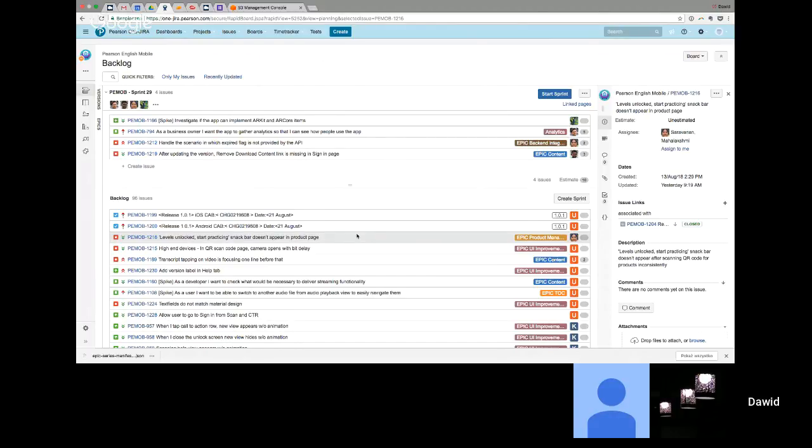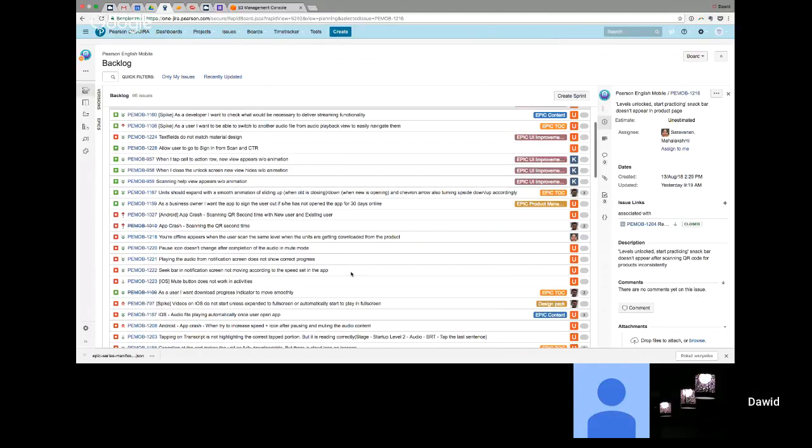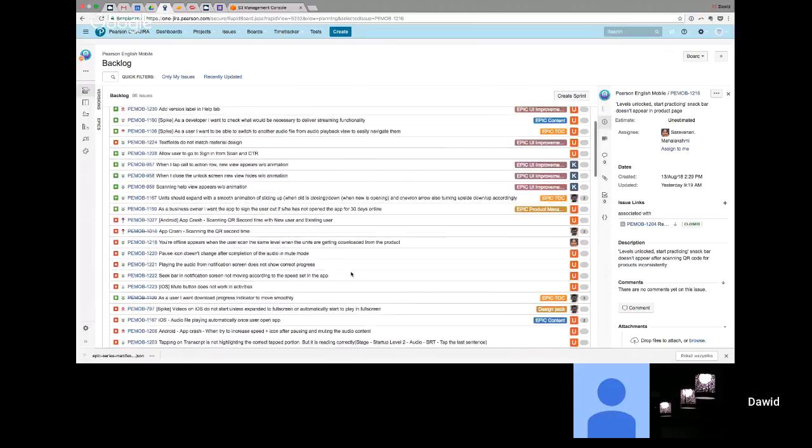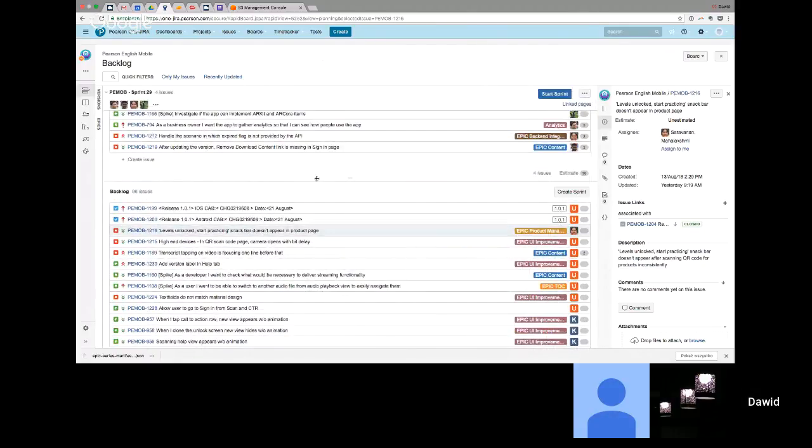Okay, so shall we leave this for now, Devin? We could, but as you can see, we have plenty of things in the backlog, and sometimes it's difficult to manage because of that. That's why I would prefer to include it in the sprint and decide whether we can fix it or not, whether we can find the steps to reproduce or not, and if we cannot, we close the story. Let's not keep it just in the backlog so that it stays there forever. My suggestion would be to reassign it to Sindhu with a comment: please find steps to reproduce, and if not, please close the story. That's how I would do it.